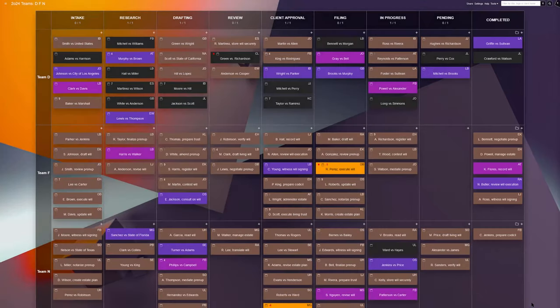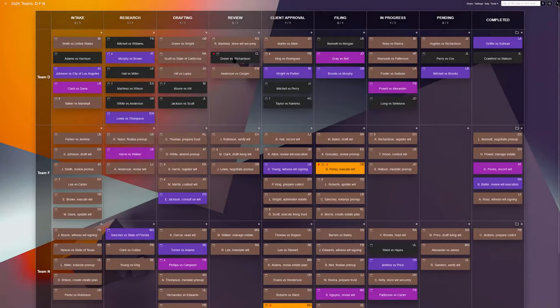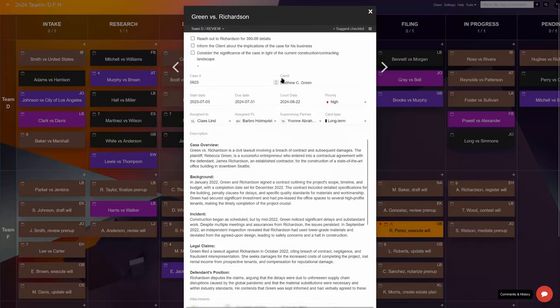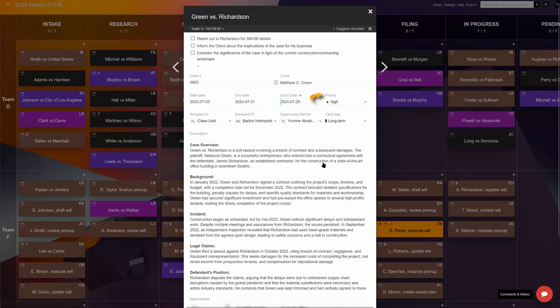Now, let's look closer at the task card structure. Each Kanban card represents a case or a specific task related to it. The team decided to make room on the cards for essential details such as case name, case number, the client's name, key dates and deadlines, priority level.